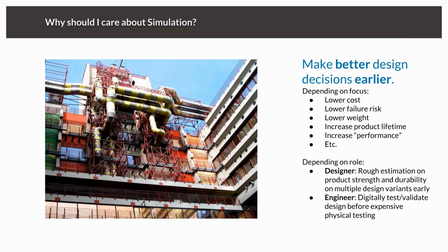And in the end, they had to build a complete new second HVAC system, which was on the outside of the building, which you can see here now. And as you can imagine, this is not only not very aesthetical, it's also very expensive in terms of planning it again, building it again. Building this was much more expensive than building the first one, because as you can see, there was a lot of additional work which came with that, like building the support structures.